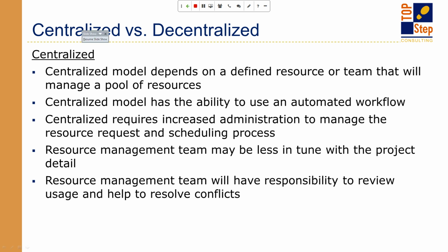This model does require an increased administration within the organization because the resource manager's focus is going to be on the resource pool. And they may have less visibility into the specifics of each project or any individual project over the life cycle.